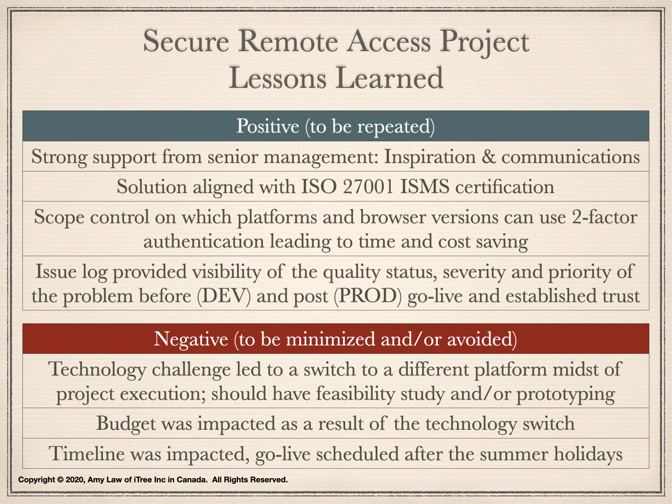The project had an effective issue log and logging process. It provided the visibility of the quality status. It also provided the severity and priority of the issue before and post go live in the development and production environment. More importantly, the issue log had a date timestamp about the actions taken from the day when the issue was reported. When a sponsor asked for the status of an issue, we could quickly look it up from the issue log. This established trust, reliabilities, and proper attention to the quality of the product.